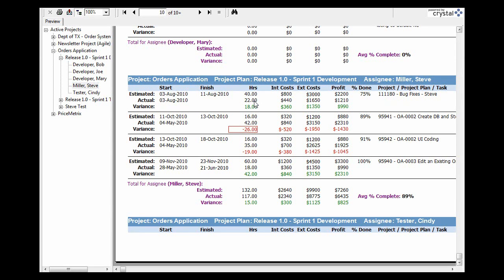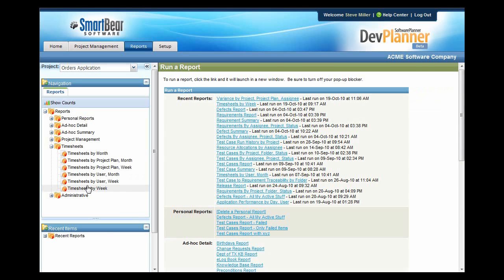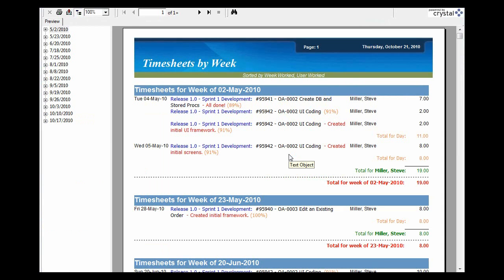Notice if their effort was less than expected, it turns green. If their effort was more than you expected, it turns red. The red variances allow you to easily see the ones that took longer than you thought. Now let's take a look at a timesheet by week to see what type of time entry we've received from our team. Week by week, person by person, we can discover how much time they've logged and specifically what they worked on. It also totals it up for the entire week.